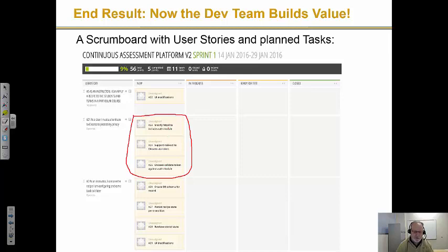Development team themselves own this. This is how we know what we need to do to get our work done. We've made the commitment to do it, so we're not going to do it in that schedule. Now, it doesn't mean you can't track work. Each one of these tasks usually has its own estimate measured a lot of times in hours of actual time, maybe measured with relative sizing again.